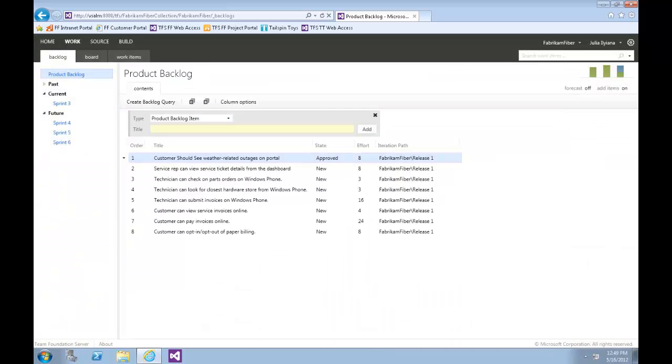Please note that each team may choose to define the effort value as they see fit, using a unit of story points, hours, days, or number of sodas required. The point here is that this measure is a relative value with respect to other work items. Work will be broken down into hours later. A popular planning approach that helps to eliminate groupthink and consider input from all team members is known as planning poker. You can read more about this from this link.